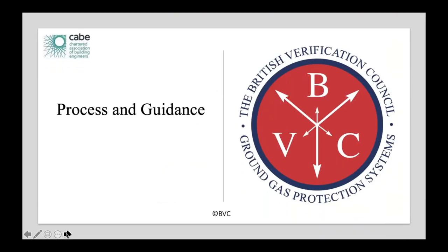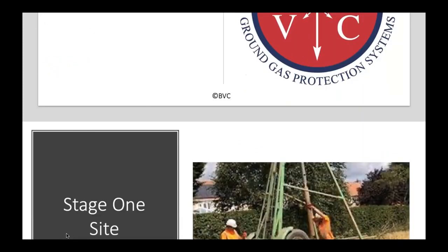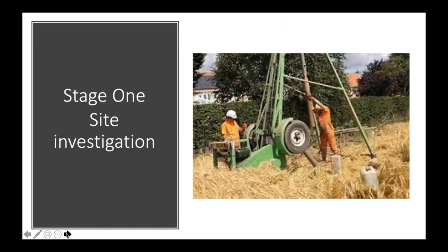The process and processing guidance — this is where I get involved as a verifier. Stage one is the site investigation. The local authority planning conditions will all ask for a site investigation and will put planning restrictions on that. They have a plan to follow, issued from local government under Part 2A, which instructs them that they've got to have a site investigation if they want to build houses, so they can assess and put planning conditions in place based on that investigation.